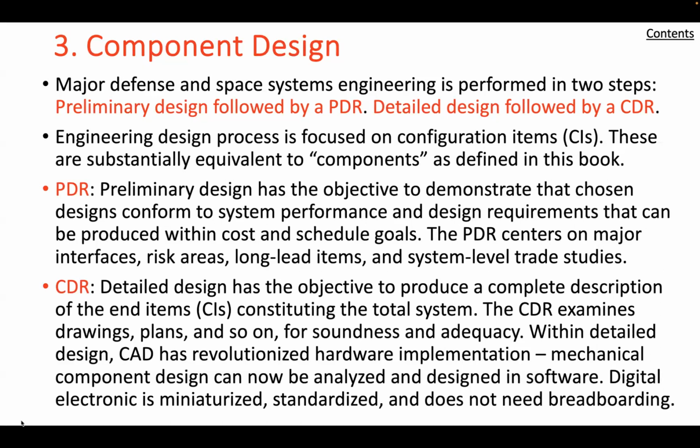Although preliminary design is typically started under systems architecting, many official programs continue to establish a subphase where the initial architecture is translated into a preliminary design. Each step is followed by a formal design review by a customer before the succeeding step is authorized.